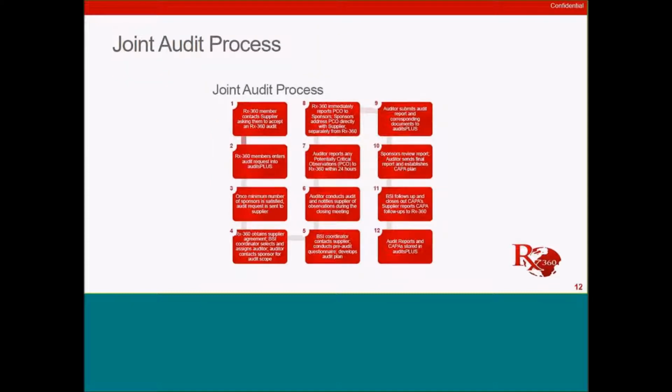The joint audit process. 1. Rx-360 members contact supplier asking to accept an Rx-360 audit. And I just want to emphasize that because I know that several members did not know that this is something they were supposed to do, and to reach out to the suppliers, talking to them about Rx-360 and the audit program. 2. Rx-360 members enter audit requests into the AuditsPLUS. 3. Once the minimum number of sponsors is satisfied, the audit request is sent to suppliers. 4. Rx-360 obtains supplier agreements, BSI coordinators select and assign the auditor, and the auditor contacts sponsors for audit scope.